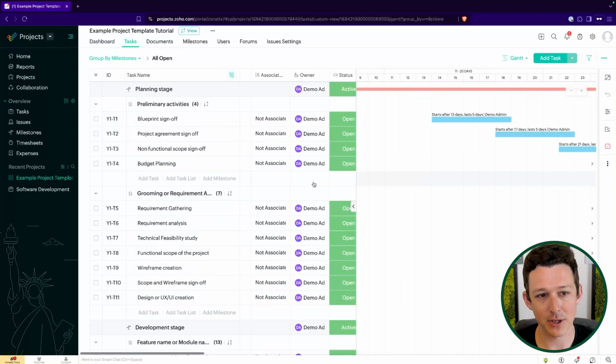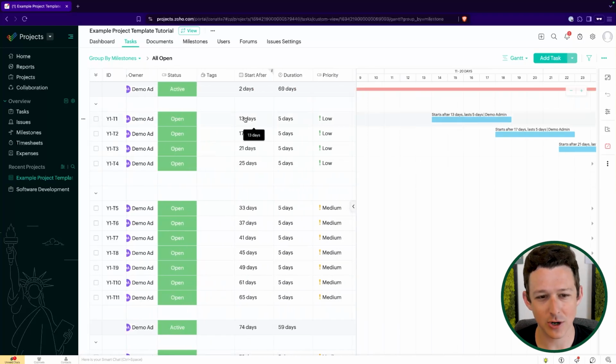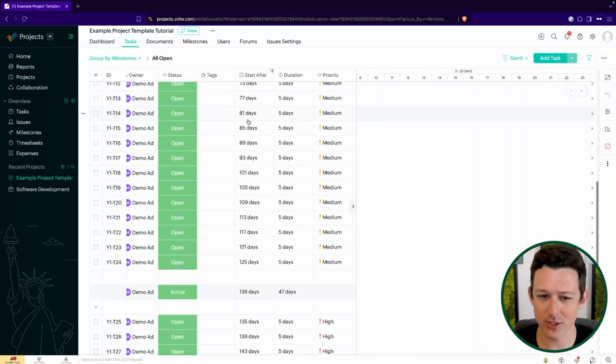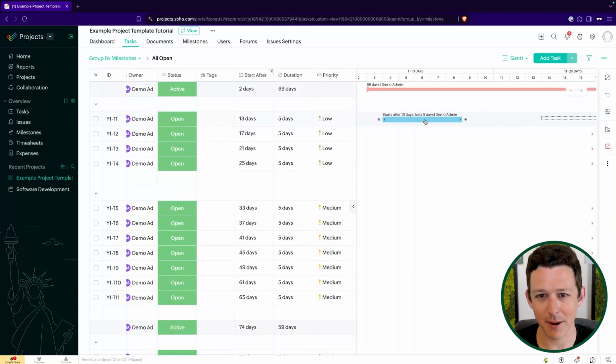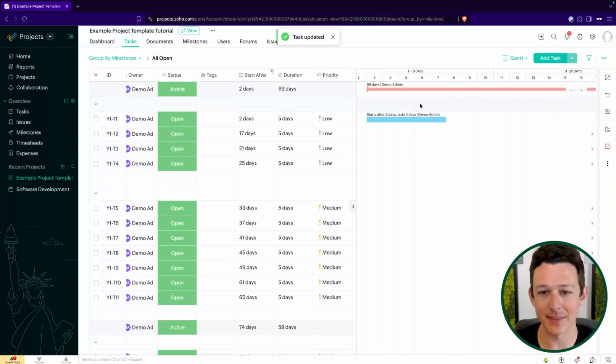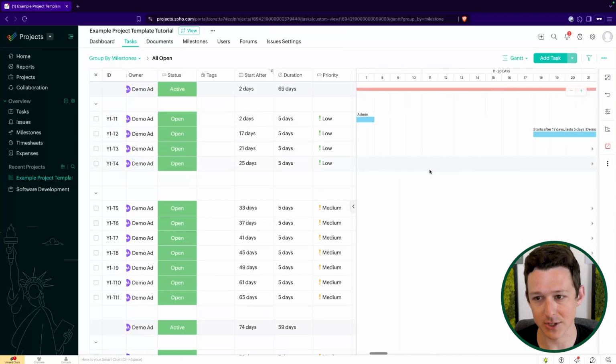So in this case, as I'm looking at this, I might go, hey, why are we starting this 13 days? This is the first task. We're waiting 13 days to get started, right? I'm like, I don't like that, right? I'm going to go ahead and back this up. Let's start immediately. So now we're basically starting at the same point that our milestone kicks off.